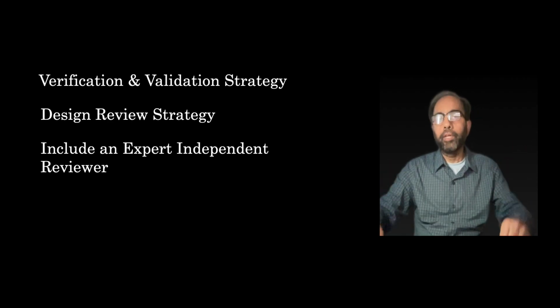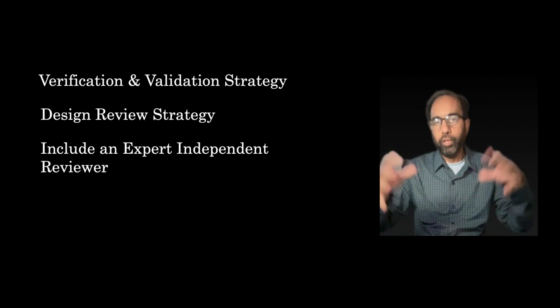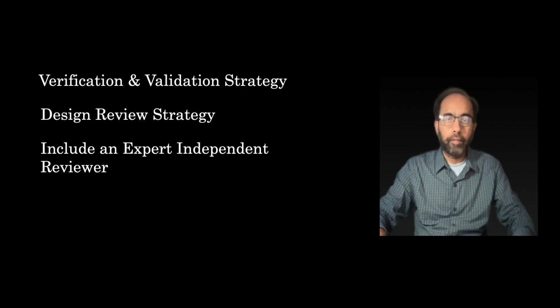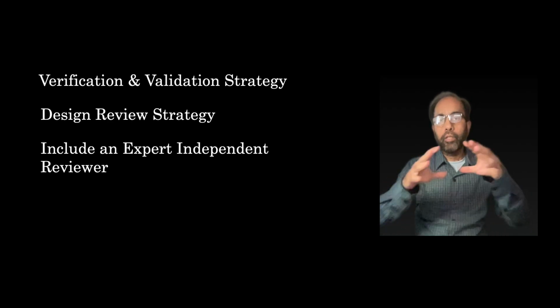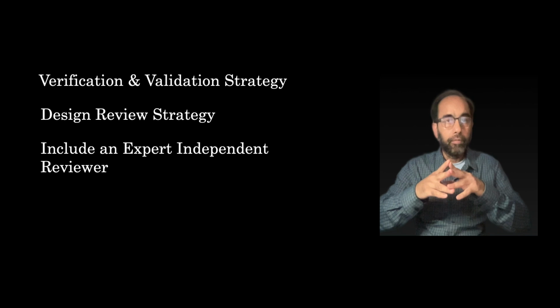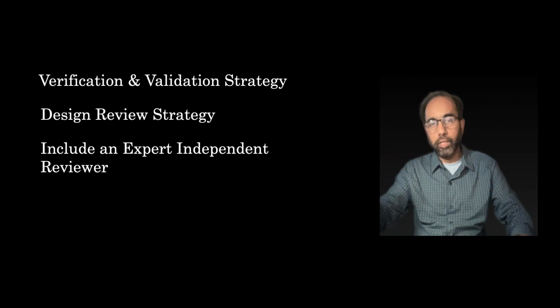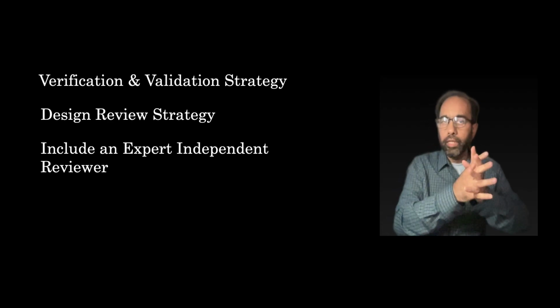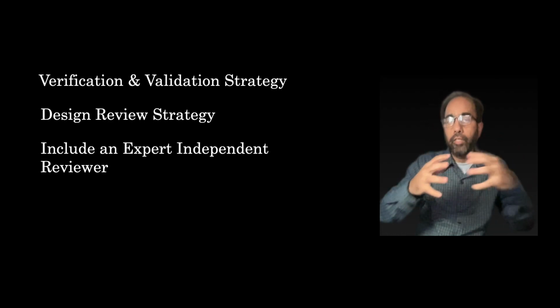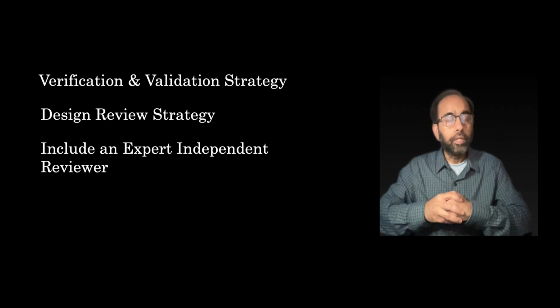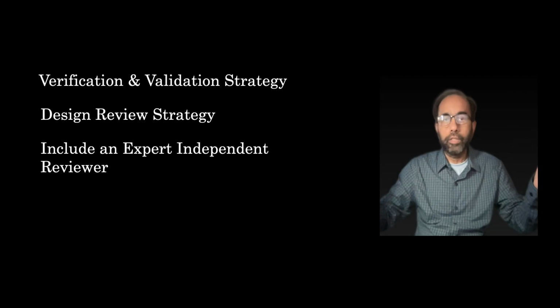You want to package them or discuss them at a high level within your design and development plan. The plan must also include formal design reviews and how frequently you plan on doing those design reviews. Are you planning on doing it in every phase, at the end of every phase as a gating mechanism? Or are you going to be doing only a few critical design reviews?